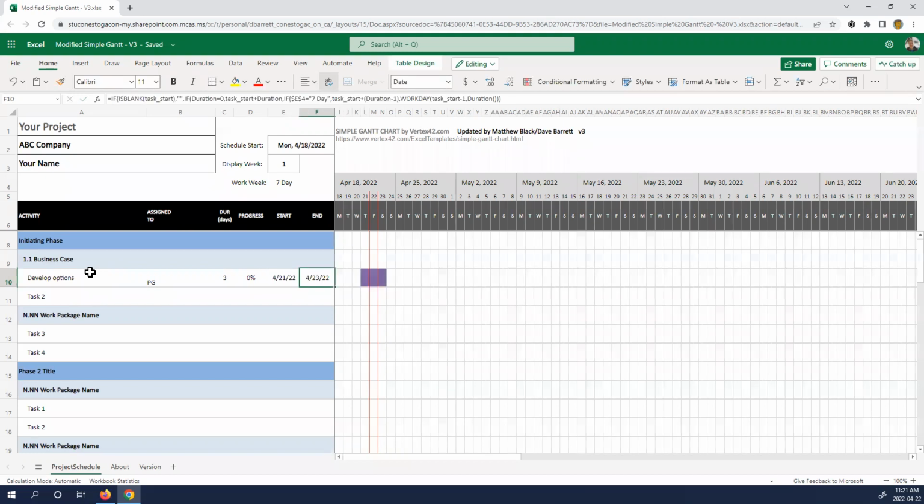Okay, now you'll notice something happened there. So two things happened. One is the end date was automatically filled in, and you never need to enter an end date in MSG. In fact, don't, right? If you look up here, there is a rather long formula in that end date. Do not copy on top of it or enter on top of it. You'll stop MSG from working effectively, and it's not protected, so it will allow you to change it. You just shouldn't change it. So always leave the end date below.